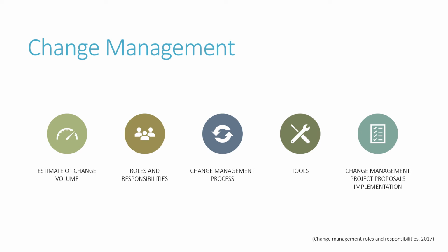Then, since so many changes will need to take place for the computer automated coding tool, the PM will develop a change management process for doing so to track, evaluate, approve, or deny the change, and then integrate it and communicate it out. Then tools to use for such coding process changes would be change request form, issue tracker, and most important, the master document mapping matrix, which identifies all the documents that will be mapped to the CAC system.